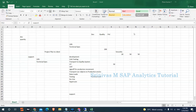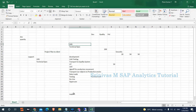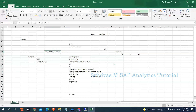Once hypercare is completed, the solution is handed over to the support team, and this is called project closure. The project plan spans from requirement gathering all the way through hypercare, and all activities must be completed within the agreed timelines.